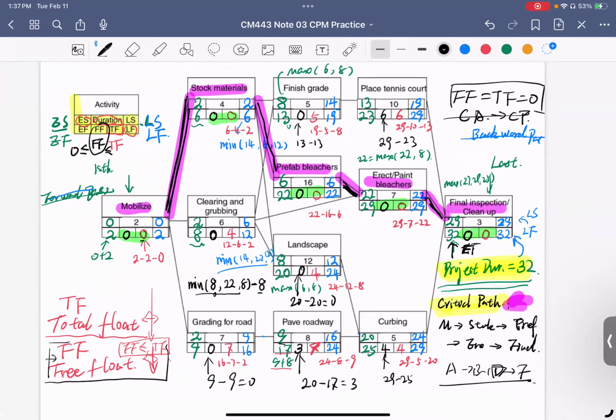So you're getting your project days from this early finish. And also your early finish time will be your late finish time. So basically those two are the same thing. Does that make sense? Yes, sir. Thank you. You're getting 32 from the forward pass, and then you put it as project duration, and then you assign it to your late finish time. So that is the cycle going.